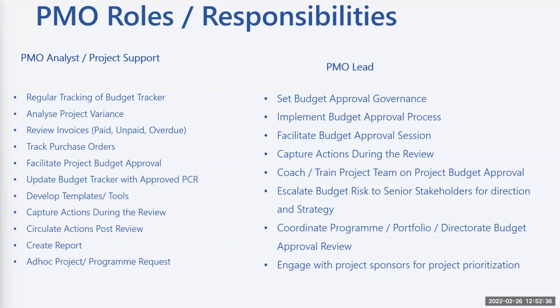So let's say you have a budget of 12,000 pounds. Sometimes it doesn't work that way anyway. They could give you a purchase order of 5,000 pounds, right? And you track it. The first month you spend 1,200. Then you need to say, okay, out of your PO value you have spent 1,200, so you have 3,800.